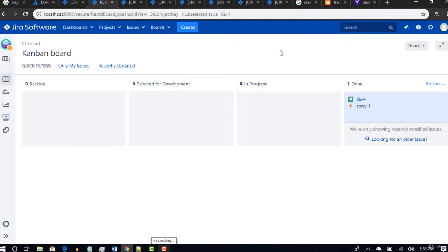Okay, so you don't have any specific sprint planning meetings in Kanban board. You do have one planning meeting to see how many stories we have, how many we are pulling. There is no specific criteria or benchmark in this Kanban. So in JIRA, you have a provision to do all this. Okay. If someone asks you to work in Kanban mode, do not panic wondering where is sprint, where is backlog. Grooming can be done, but sprint planning meetings, anything related to sprint will not be present in Kanban. So just don't panic. That's the only reason I made this lecture.